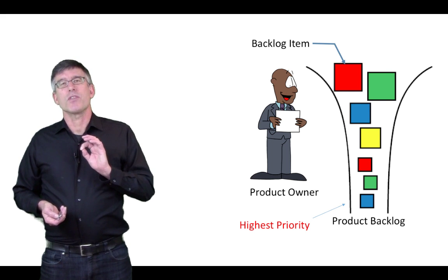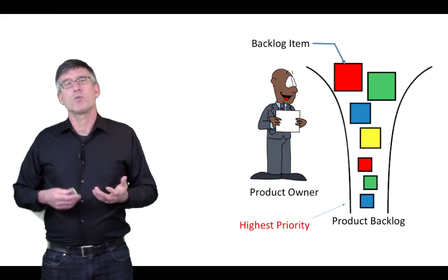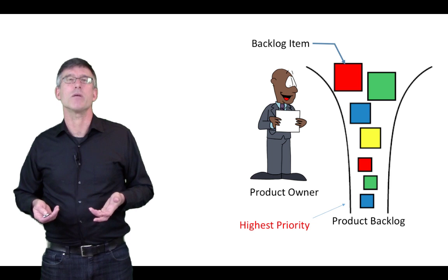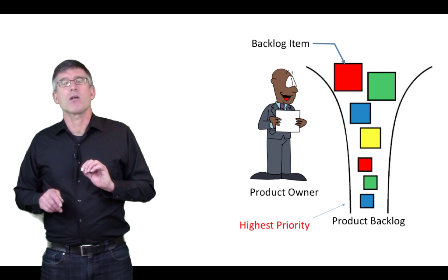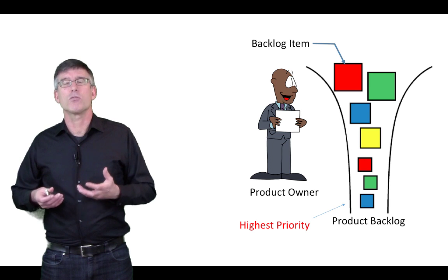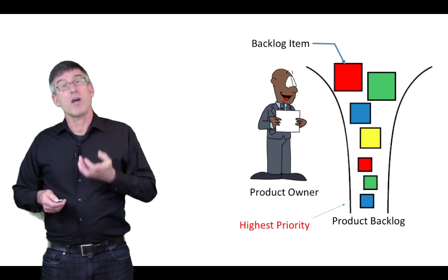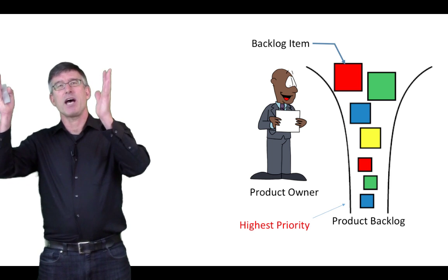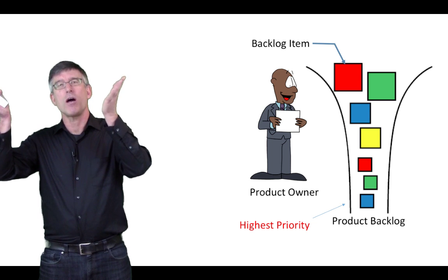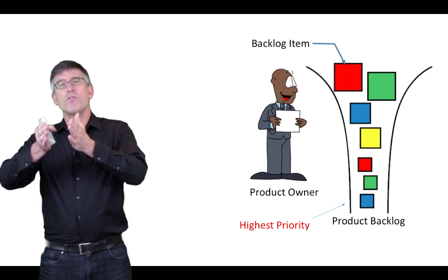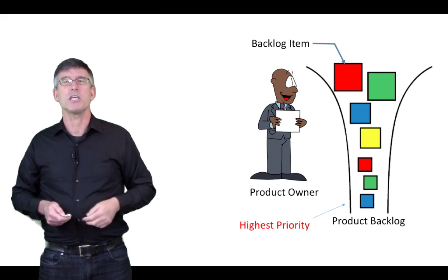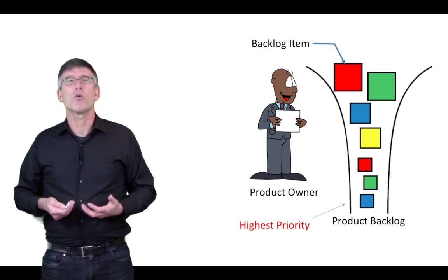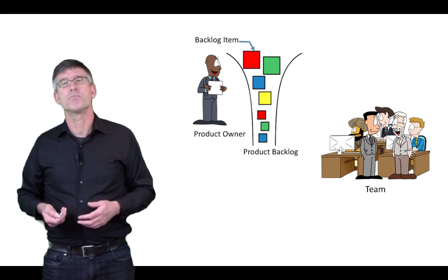You will also notice here that if you've seen Scrum drawn up in textbooks, the way that we draw the backlog is a little bit different. In fact, it appears to be upside down. We like to think of the backlog as more like modeling it on a rock crusher, where the highest priority stories are actually at the bottom of this backlog or drawn at the bottom. And as you can imagine, we have sort of big abstract work at the top, the big items, and progressively they get refined until they can be pulled in by the team. So this is, I think, just a much more accurate and appropriate way to draw a backlog.